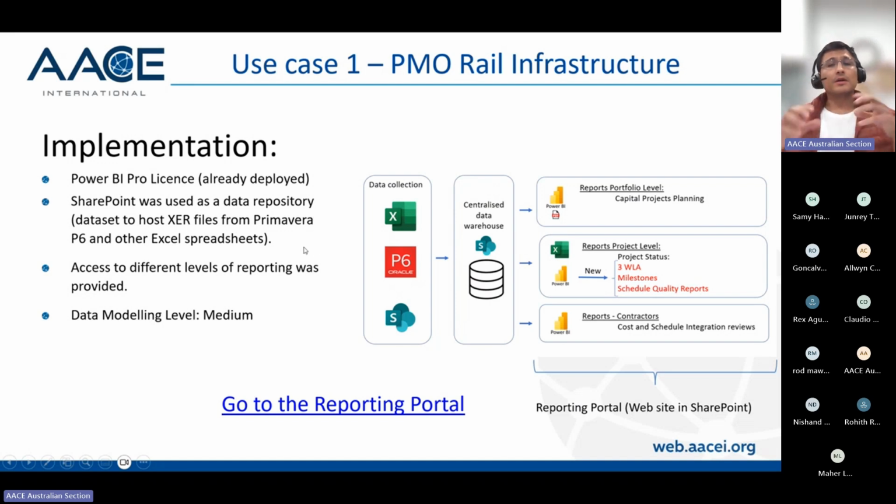So basically, our data warehouse was SharePoint, and we were able to produce reports for these 3 levels and grant access accordingly, so that a person that is below the project team in that kind of hierarchy cannot access the sensitive information that might be in the portfolio kind of reports. So we were able to grant access accordingly based on roles in Power BI.